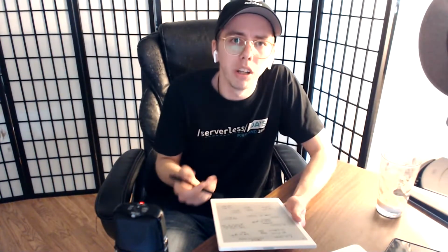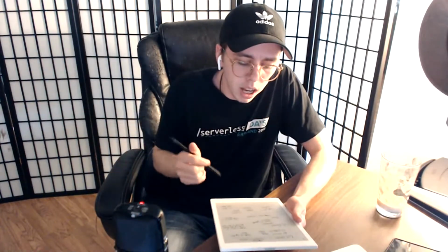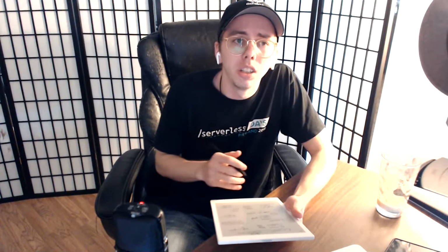It definitely breaks down. Let's say the formal approach would be a Kanban board, and Kanban's a way of doing project management where you create little tickets, you create columns, and then as you go through, you move it from backlog to in progress to done, to testing, to review, to release, and you can keep creating additional columns. The thing with that is it's very good when you have more than a couple people on the project, right? So it's much better even if you have two people, right?